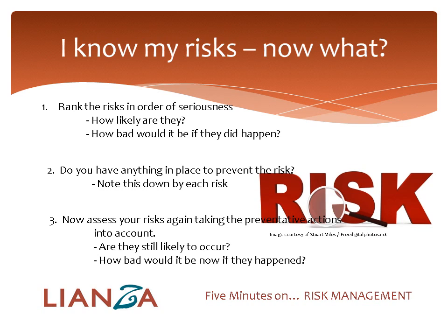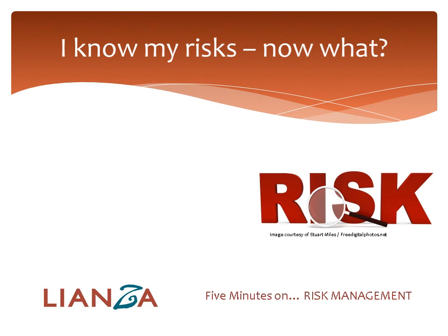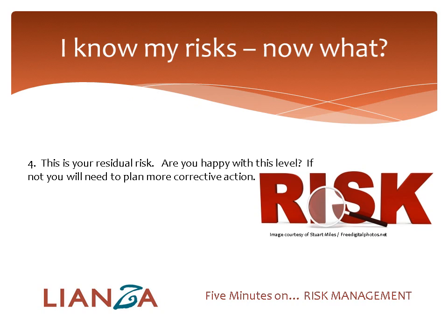Then look at the corrective or preventative action you have in place against each risk. What are you currently doing to stop that risk from occurring? What plans do you have in place to mitigate the damage that might happen if it does occur? Once you have done that for each risk, reassess the seriousness. Are the risks still likely to occur? Will the damage be as bad if they do? This is your residual risk.